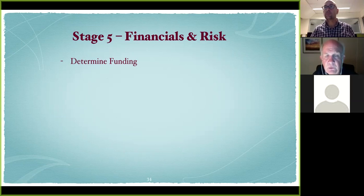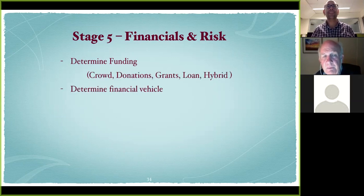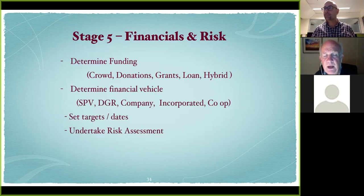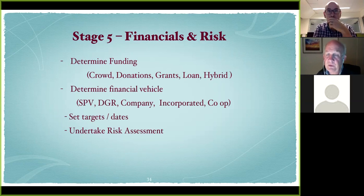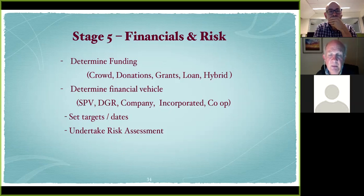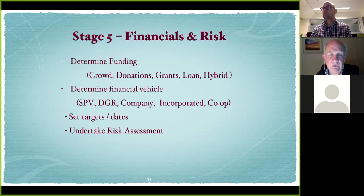They work out how to fund the project. They've done their own crowdfunding — not through Pozible or GoGet — as well as donations and grants. On the last project they also took a small $10,000 loan to test their power purchase agreement with the bank, which accepted it. If they go back for $100,000 next time, the bank can see the agreement has been tested and that repayments are being made. This is a hybrid model. They then decide on the legal vehicle: crowdfunding, revolving energy fund, special purpose vehicle, DGR-status organisation for tax-deductible donations, incorporated association, or a co-op. BSG is itself an incorporated association. They set dates and targets and undertake a fairly extensive risk assessment covering technical feasibility, high wind areas, and panel security — working with the council through that assessment.